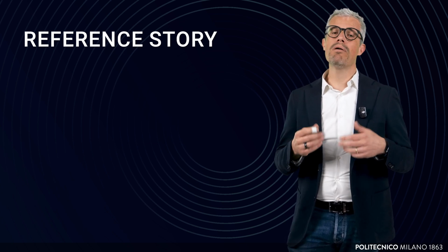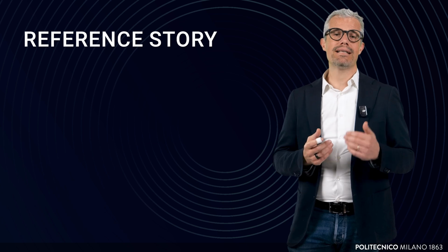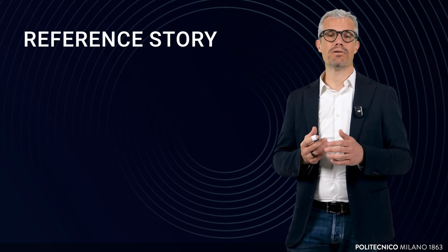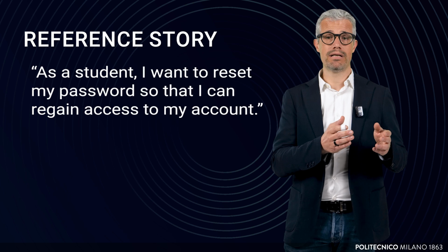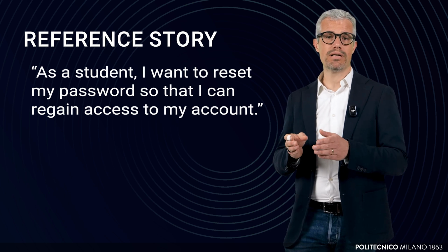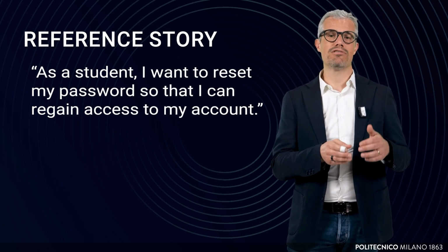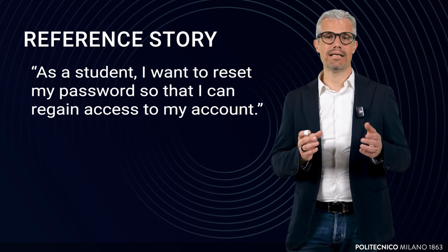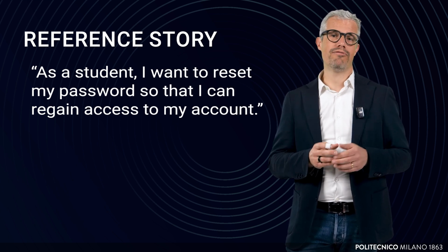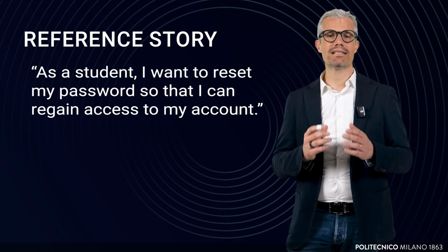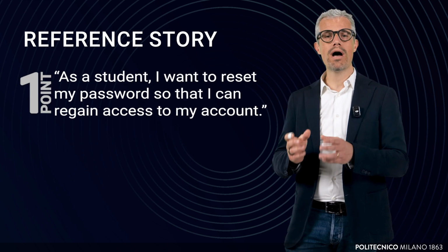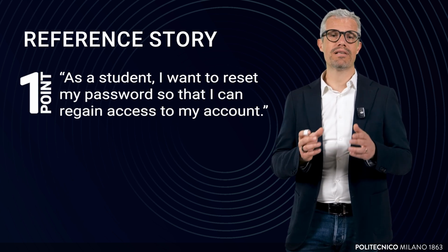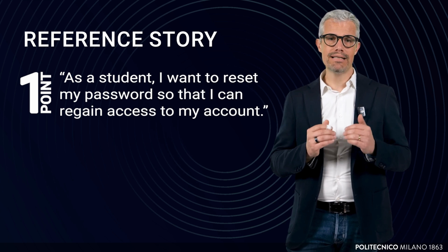For example, in our MOOC platform, the team might decide on a very nimble user story such as: as a student, I want to reset my password so that I can regain access to my account. This story is clear, has minimal complexity, and involves predictable effort. The team agrees to assign this reference story 1 point, and all subsequent estimates will use this as a comparison point.